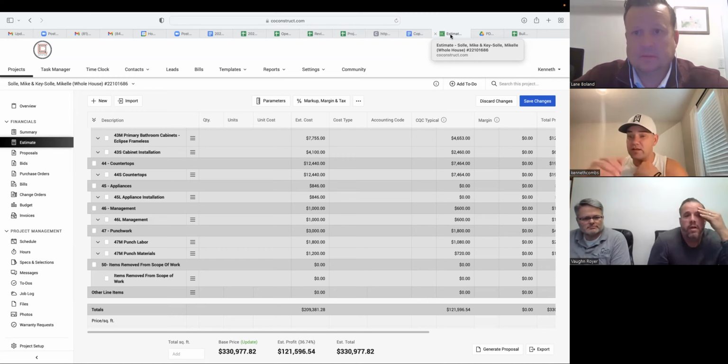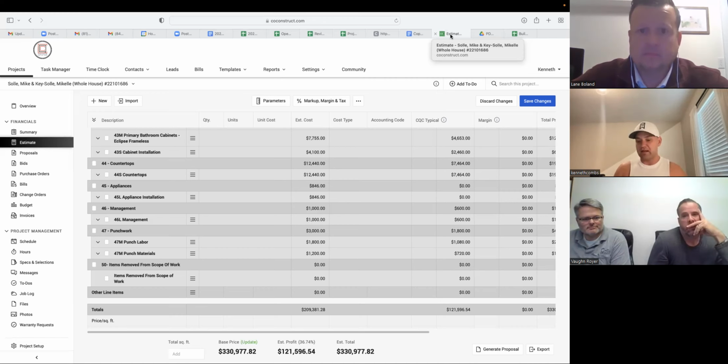I'm doing a kitchen right now that has $120,000 worth of cabinetry in it. That's what I tell them. I just can't because inevitably what happens, and remember, this is not you. You're going to have a PD out there that works for you doing this, right? So inevitably you don't think through everything when you're giving them that number. Whereas when you go back to your office and you do the square footages, you look at the roof lines, you look at the setbacks, you start thinking through, what is it going to take to do that?